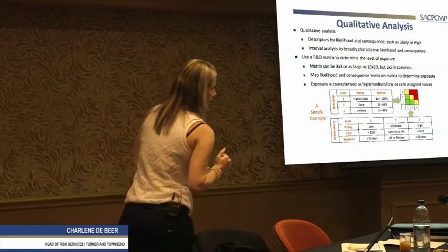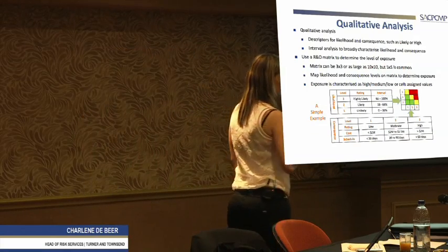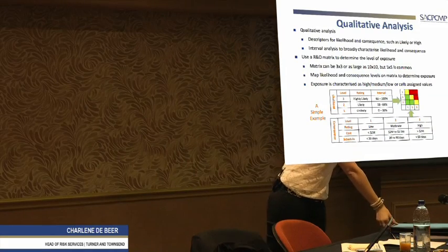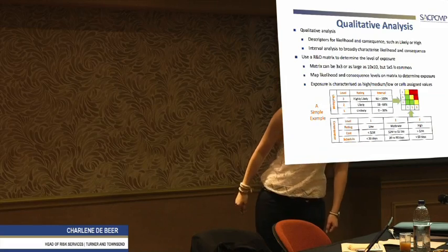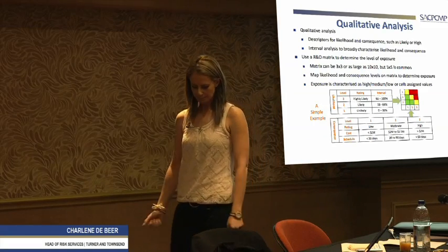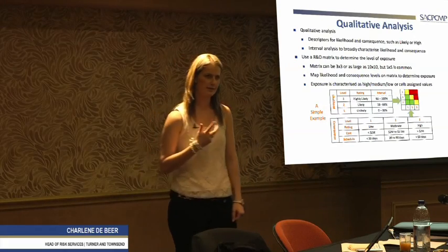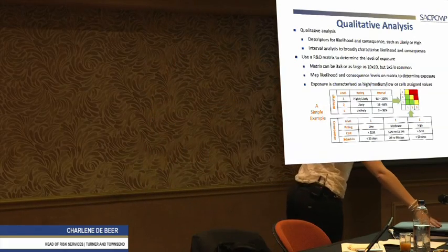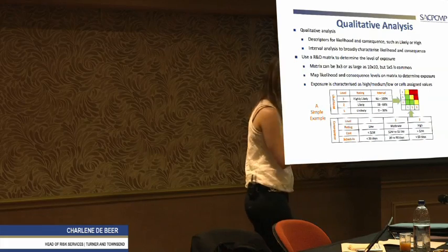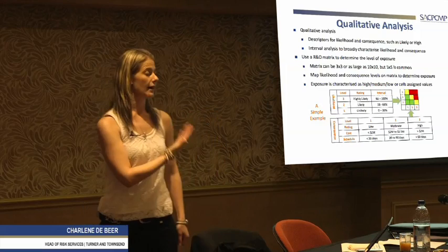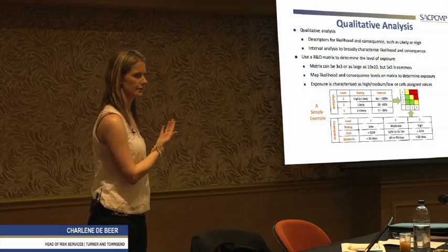So when we go to quantitative, you guys will see that sometimes I get called to a project and I'm not asked just to do project risk management, I'm asked to assess the planner's schedule and tell them what the integrity of the schedule is like. Does it have too much float in it? Does it have open-ended activities, etc.? Because as soon as I start analyzing that from a risk point of view, you pick up on a lot of things, and I'm going to show you why and how we do that on the quantitative side.